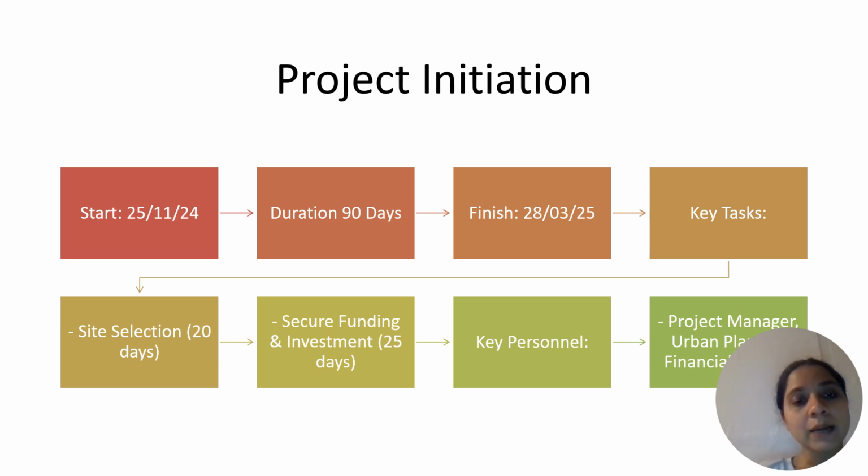Now I'm going to tell you about project initiation, like when our project started. The start date is 25 November 2024 and the duration is 90 days, which is almost 3 months, and the end date is 28 March 2025. The key tasks are site selection, which took 20 days, and secure funding and investment, which takes 25 days.